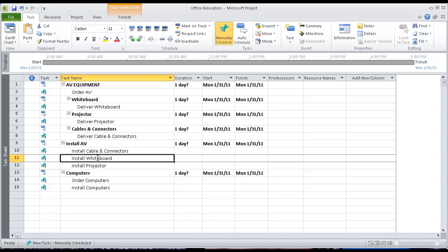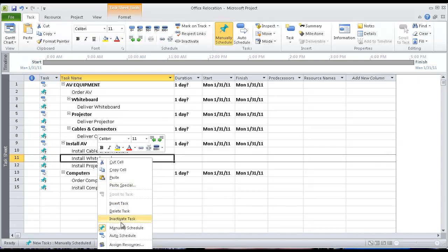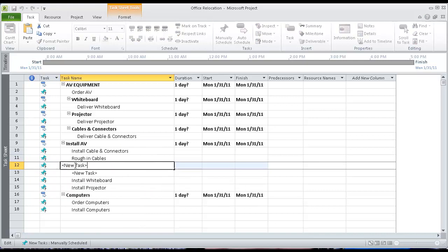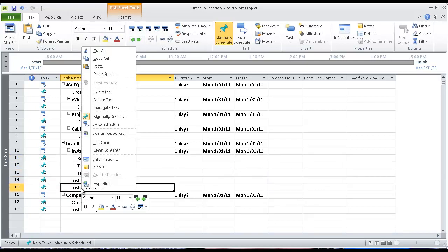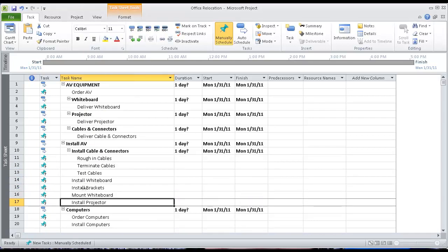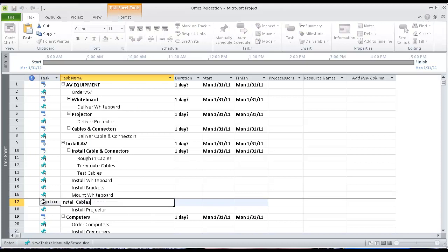If I select Insert Task, the task will be inserted above the selected task. I then select my new task to edit the name. I use the F2 button to quickly enter edit mode. In our example, I add activities or tasks in several places. To keep my WBS organized, I'm adding the activities in the sequence that they are performed. However, this is not necessary, and at times it's not practical. You'll see this later on. Once again, as I add tasks, I indent them as appropriate.